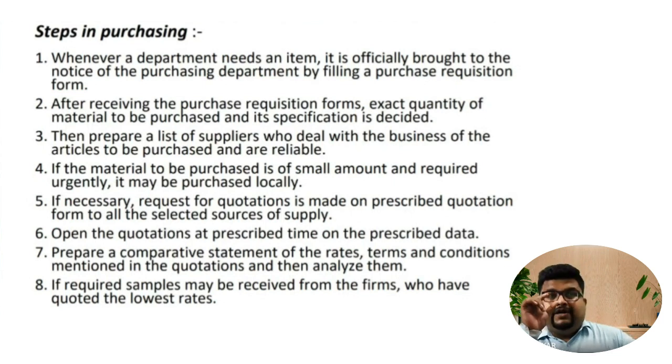Now, when that particular action is taken, for example, quotations are received, then a comparative statement is created, and then we see that the material is required for X or XYZ quantity from that particular vendor. Then we finalize from which person or which vendor we should go and buy this material. So these are the steps involved in the purchase of any material in a project.